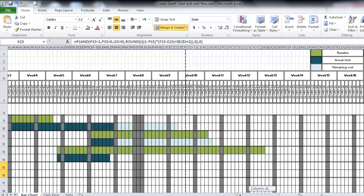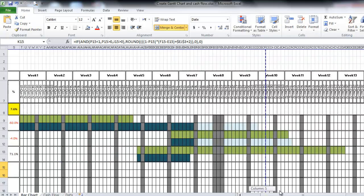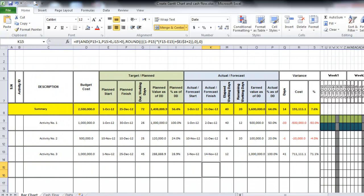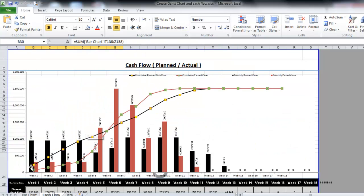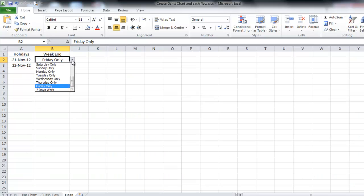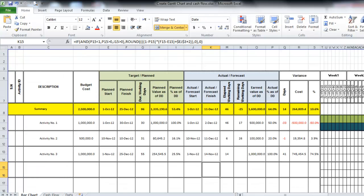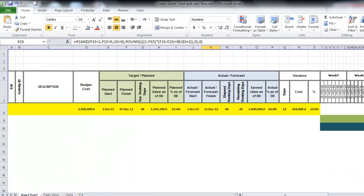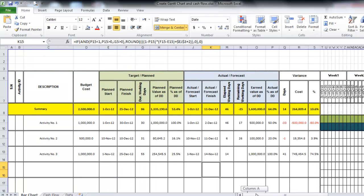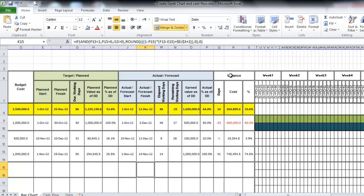It will give you the actual values, and this will be reflected automatically and will draw your cash flow. At any time you can change the working days setting and everything will be recalculated. The variance shown is the variance between the plan and the actual — in days, in cost, and in percentage.